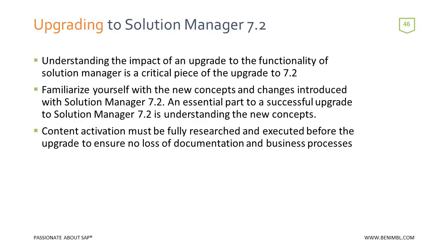Carefully activate content, ensuring you've activated all the proper content. There are a number of notes out there that you can find that will give you reports that will list out all of your projects and any content within that, because it's very important to ensure you activate all of your solution documentation into the new versions within 7.2 to ensure they can still be used within 7.2. So researching that and reading about it fully is very important. So overall, being prepared for the upgrade is the best way to ensure a successful upgrade.